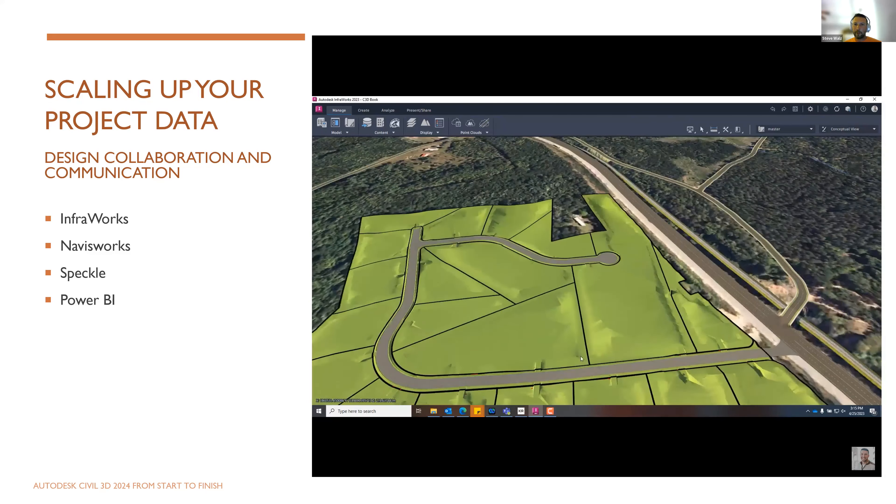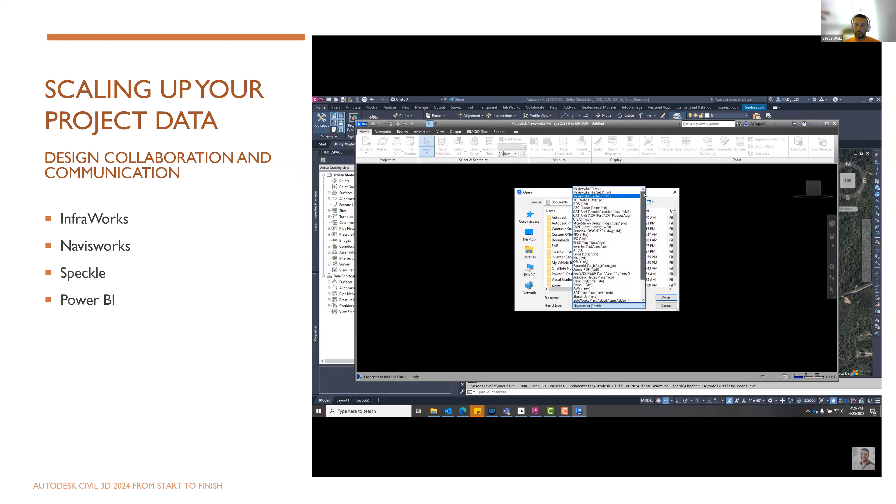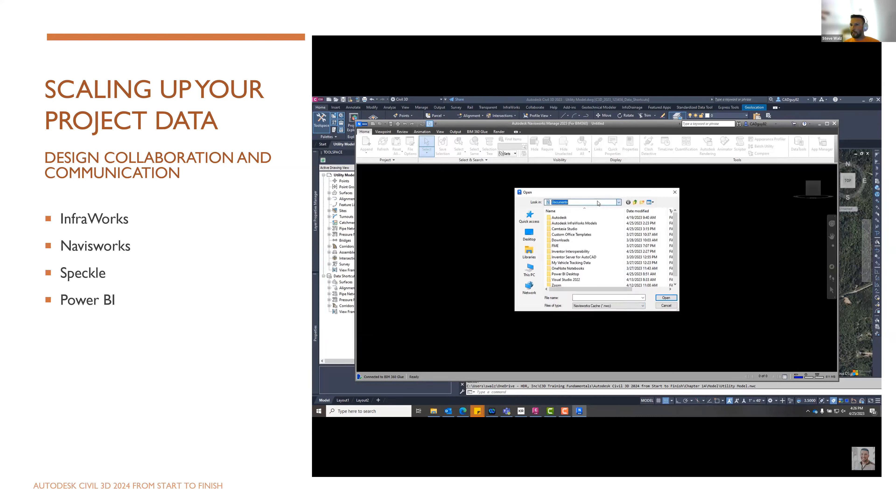Switching over to Navisworks, this is a little more of a detailed process. So we're going to leverage the NWC out command for this directly within Civil 3D to create an NWC file that's being read within Navisworks. And that's going to carry all of the model geometry from our design, along with the metadata associated with that. And they'll be able to be surfaced and analyzed further within Navisworks environment. And we use this a lot for design review purposes. So with the project team, we'll sit down with the project team, sometimes the client, project manager, and we'll just hash out any conflicts that we see. So we'll bring Revit models, Civil 3D models, OpenRoads designer models, and so on into this one environment. And we're able to generate reports and do some level of issue tracking.